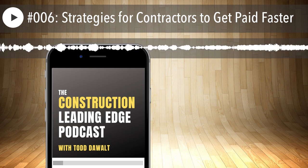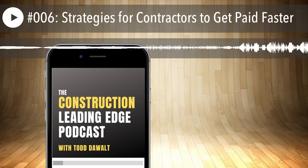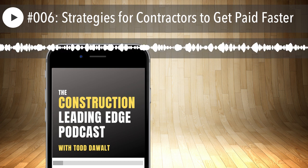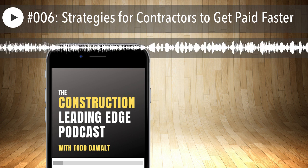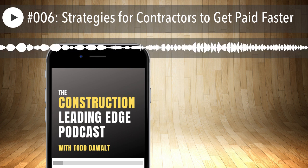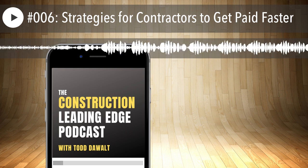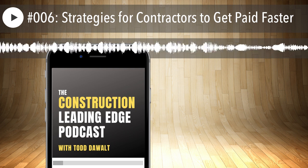You may not take a down payment, but at least you have a credit card number to hit if you have problems getting paid. And what I like to do typically on small projects is I'll have, let's say, a 50% profit margin on a small project, and I'll ask for 50% down. That way my costs are covered by the down payment in the event they don't pay.